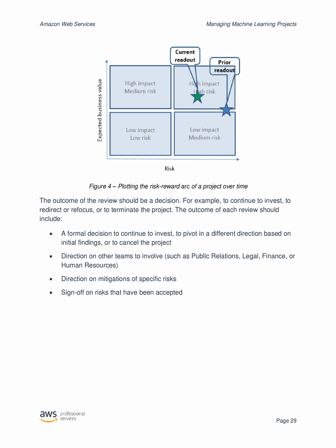The outcome of each review should include a formal decision to continue to invest, to pivot in a different direction based on initial findings, or to cancel the project. Direction on other teams to involve, such as public relations, legal, finance, or human resources. Direction on mitigations of specific risks. Sign off on risks that have been accepted.